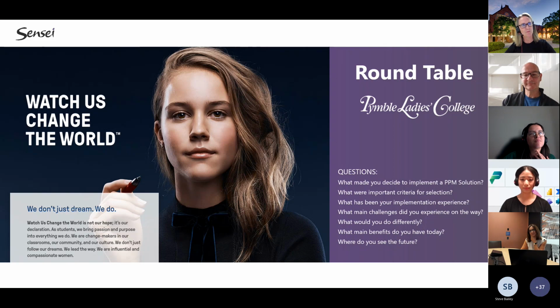We continue to improve process. The school is a complex environment, and I would say that in the operations space, that process is certainly being mapped through. As we move into the opportunities in the curriculum space and the wellbeing space in terms of program management, certainly we would look at improving process there. One of the big things for us is that we might have 150 events every year, so why not recycle the project schedule that we use in Project for the Web and copy that template every single time we have an event.